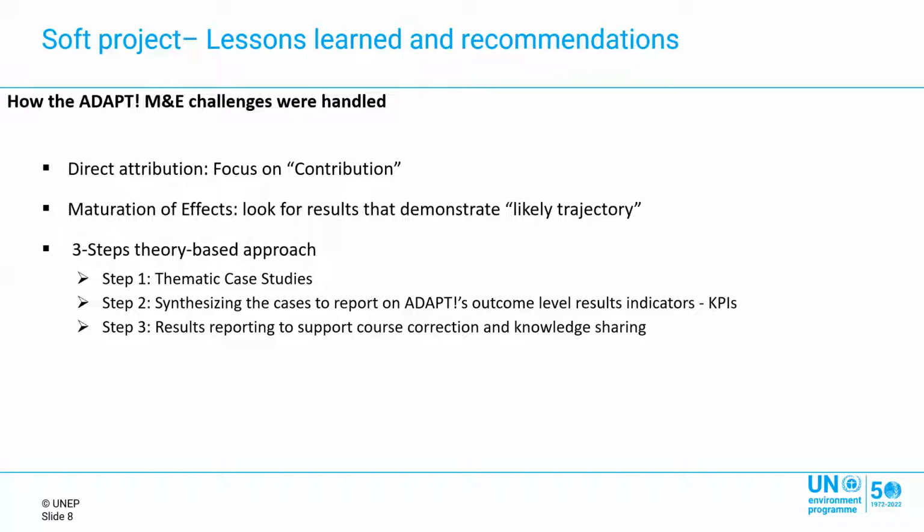So we had thematic case studies. It was a very complex project, so we identified the themes of mainstreaming, water management, natural resource management, climate change, etc. We had different case studies. Then we synthesized these cases on outcome level results, indicators, and KPIs.